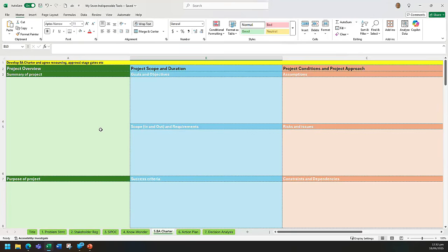We had design standards, so we had a design standards charter, and then we had maintenance, because there are different maintenance regimes, so we had a maintenance charter and that sort of thing. We ended up having one of these for the main project, the overview, and then one for each of those work streams. Then we could manage each group, whether a single person or a single function within the organization, or where they were similar, we pulled them together. The rats and mice might have been just one. Every one of those requirements fell into one of those charters.